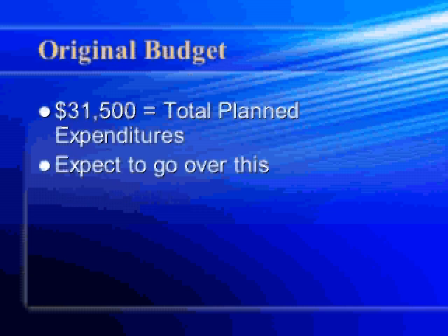As mentioned, the overrun budget cannot be calculated since we do not have the actual costs for any of the activities in this project. However, we can expect the project to exceed its original budget of $31,500, since the estimated project end is double the original planned duration.